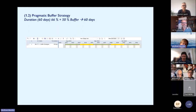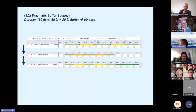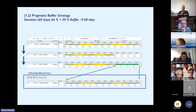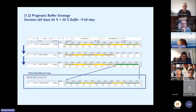In a hands-on plan, you have a simple project plan with five work packages. We typically reduce the duration to 66 percent and half of that becomes the buffer, so the total duration is the same — no one can complain. Now you have a buffered plan. Links can easily show the de-buffered version, so if you talk with a customer you show them the de-buffered version, and internally you have the buffer. There's no hurdle in buffering projects.